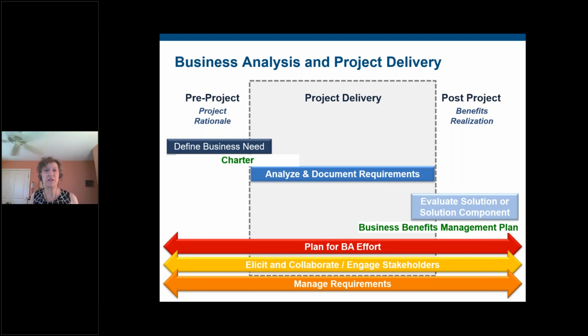That is a key piece of their value proposition, that they take note of what are the metrics that we're going to be looking at. Thinking early on as part of planning, what are we going to be measuring? And so as a project manager, I can tag team with them and understand the work that they're doing, because that helps me also validate the work that we've done on the project, so that I know, looking back, was it worth it? I want to be able to answer those questions as well.